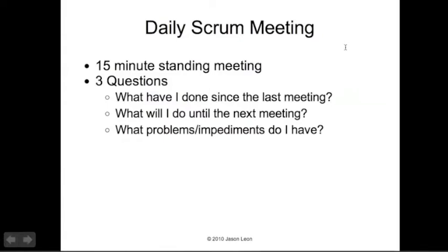What have I done since the last meeting? Or what did I do yesterday? What will I do until the next meeting? Or what will I do today? And what are my impediments? Right? If you answer those 3 questions, everyone in the group, you have a great sense as to how the project's doing.